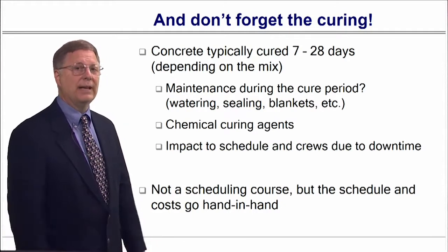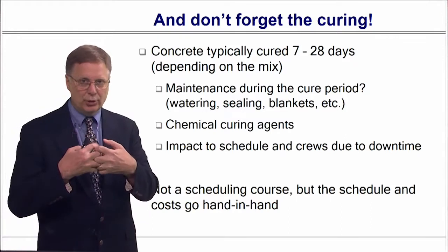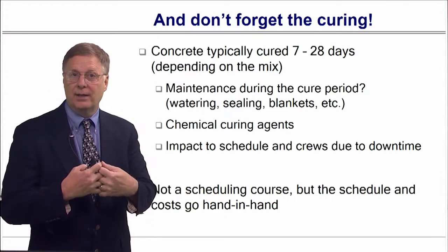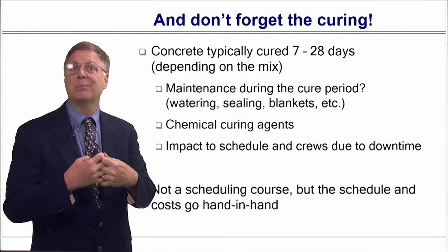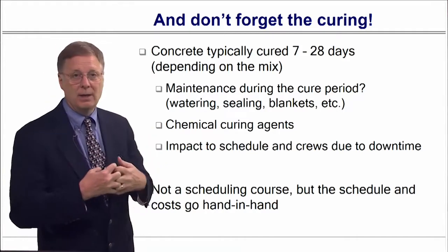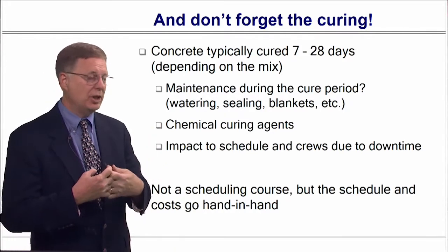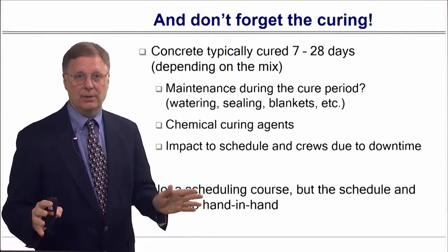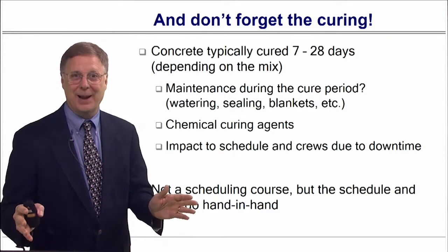And don't ever forget when you're managing a project, and this is the emphasis here, schedule and cost are entwined. And concrete affects the schedule like you would not believe because you've got a cure time. Most of your regular cure concrete is 28 days. There's no wanting it to go faster. A wing commander can direct it to go faster. It's just not going to go faster, all right?